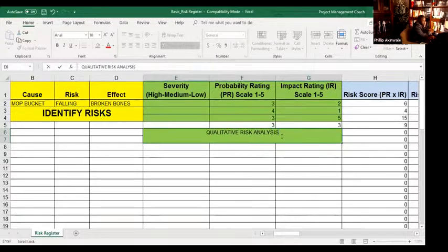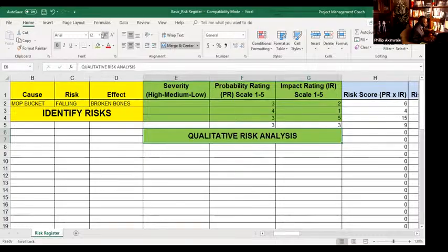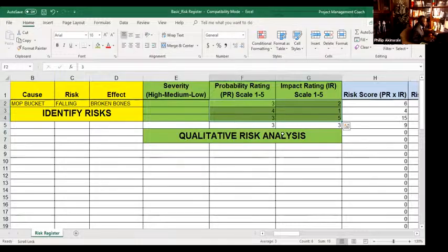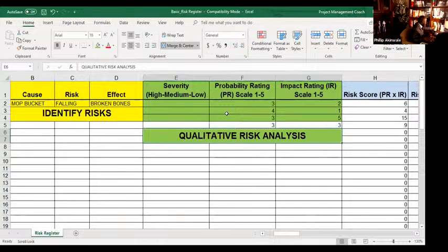So when you put in your numbers on a scale, you are not quantitative. Don't let the question trick you by saying, oh, you've got numbers 1 to 10. It's still qualitative. Why? Because anyone could say on a scale of 1 to 10 on my project, it's a 3. Is a 3 the same on my project as it is on Jason's project? No. What about Donna's project? No. It's a relative ranking system. That's what it is. So it is qualitative.